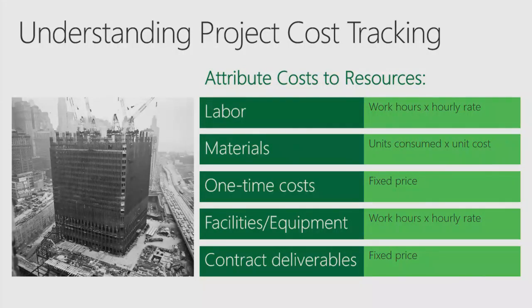When we track these sorts of costs in Microsoft Project, labor is really simple. As long as you're planning out how many hours of work need to be performed, you put an hourly rate on that, and Project does the math for you. Super easy. Materials, similar sort of thing.